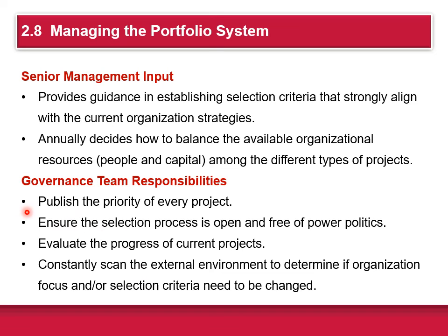They publish the priority of each project, ensure the selection process is open and free of politics. They're the ones that evaluate the progress of current projects, and they constantly are on the lookout for new projects, and to determine also whether the selection criteria need to be modified as new information comes up.